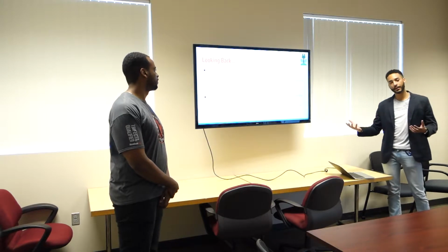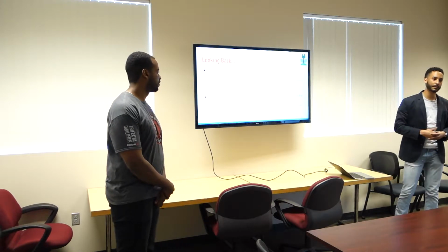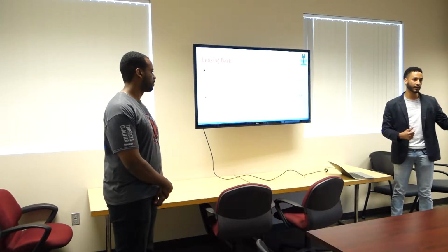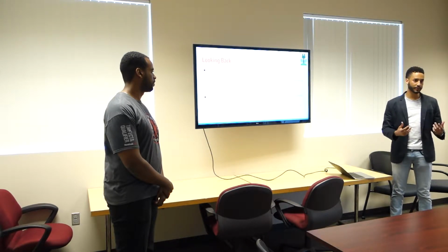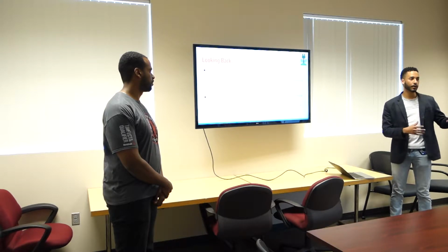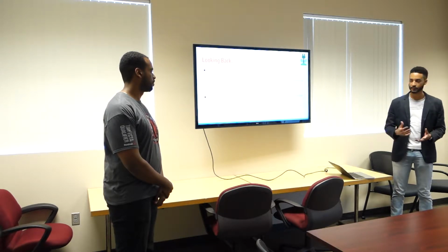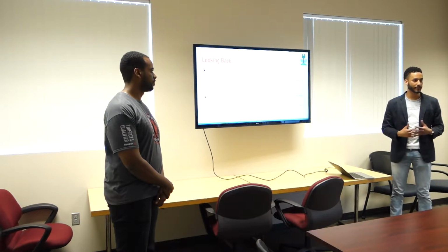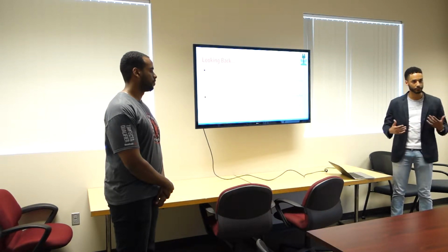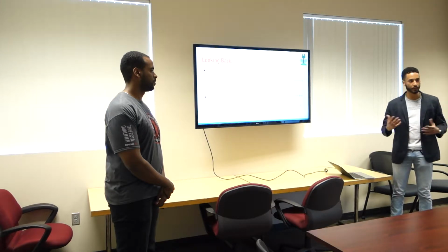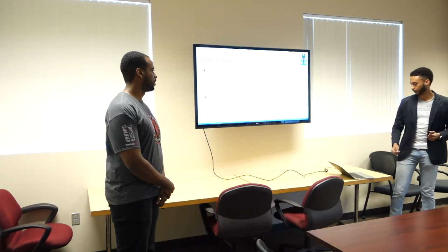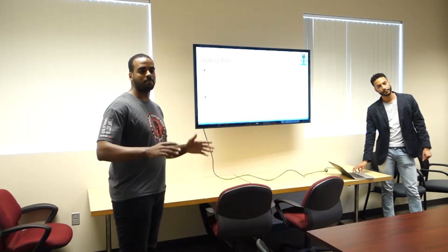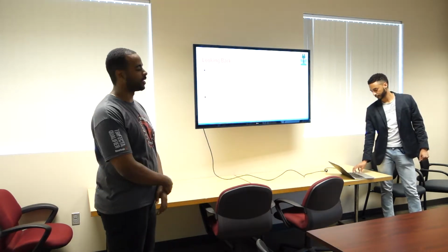And the thing that we could have done better, once again, is bureaucracy. That took a long time. Sometimes we wanted to have specific bills, or we wanted to have energy consumption for a certain area, and it was very hard to get that because of privacy. So we had to keep a sort of balance between the people's privacy and at the same time getting that data. So that was one problem. And the other thing was a certain company that promised us certain software that didn't go through at the right time, so we had to do a different software or call other people and basically replace what should have been given. So basically, we would request that data earlier and try to find plan Bs and plan Cs before we set on the plan.